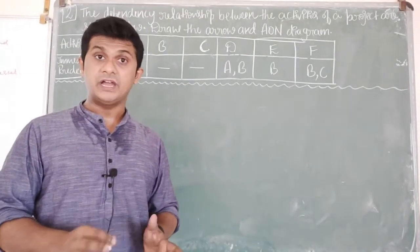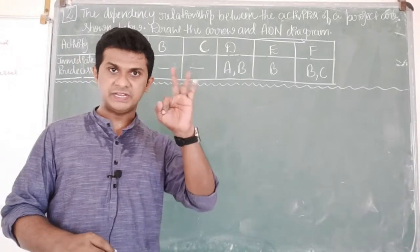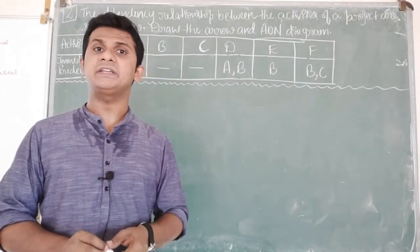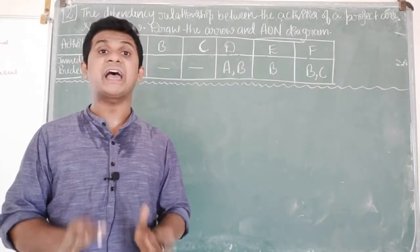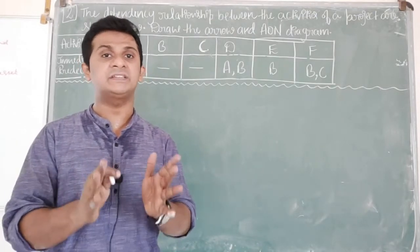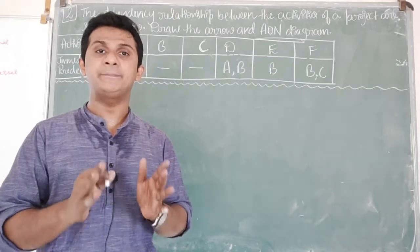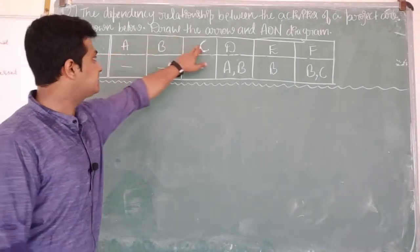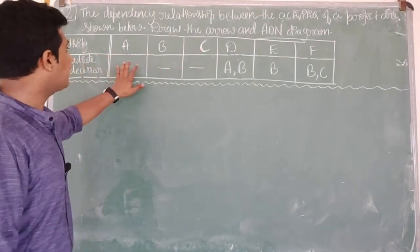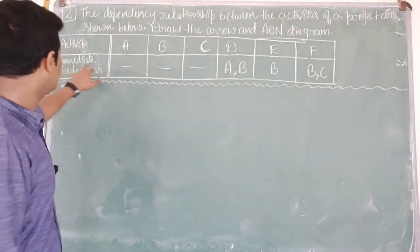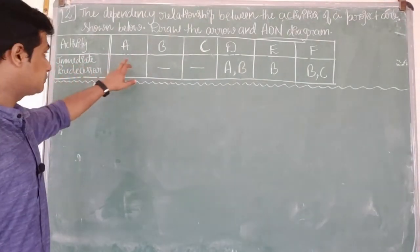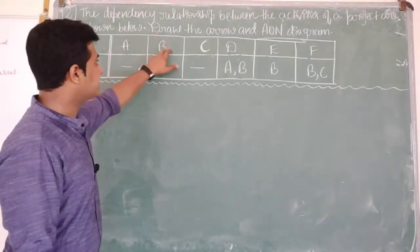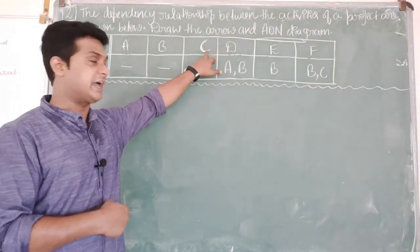In drawing an arrow diagram, we have to give due consideration to three aspects. First, we have to identify the starting activities — those activities which do not have any immediate predecessor, meaning no preceding activities. Looking at the question, activities A, B, and C do not have any preceding activity, so they become the starting activities in our arrow diagram.